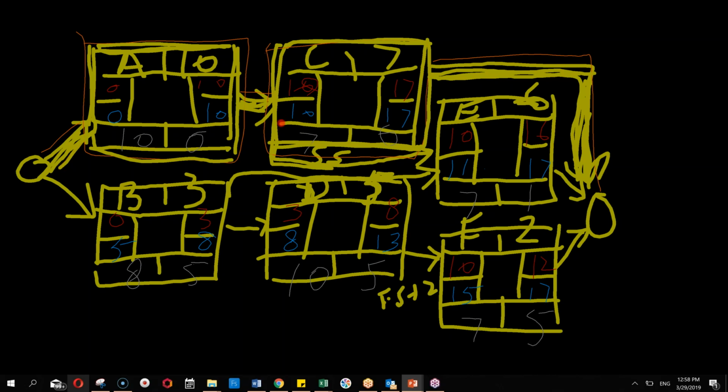I get an 11, but from the end of the project, I get 17 minus 7, 10. So whichever is lower, 10 or 11, 10 would be the case here. That's why I ignore the start to start one, and I take 10. So I take the 10 backward to A, 10 minus 0, 0. Now come back to F. F, the latest start was 15. I had to subtract 2 because I am going backward. I added 2 forward. Now I am going back, I subtract 2. 15 minus 2, latest finish of D is 13.